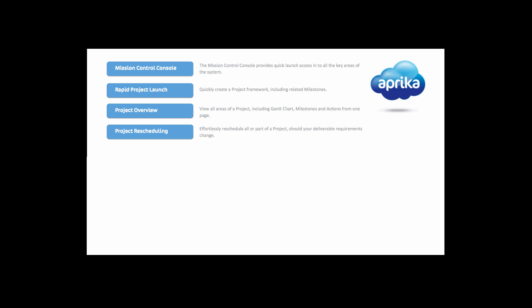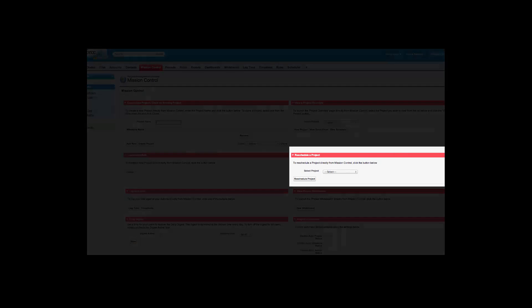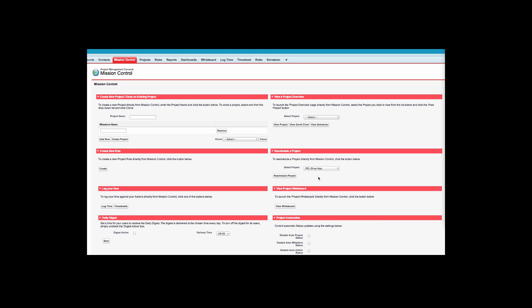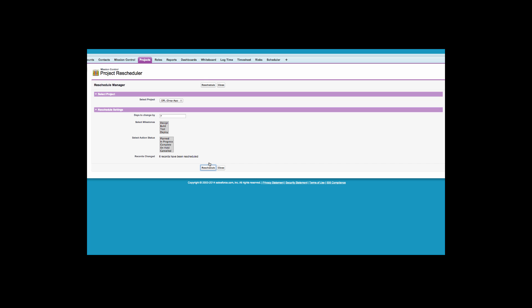Another great feature of mission control is the ability to effortlessly reschedule projects when your deliverable requirements change. Simply select a project from the picklist within the mission control console and click the reschedule project button. Here I am rescheduling the project by 7 days. You can even choose specific milestones and action statuses to reschedule. Once you have clicked the button to reschedule, you will receive confirmation at the bottom of the page.